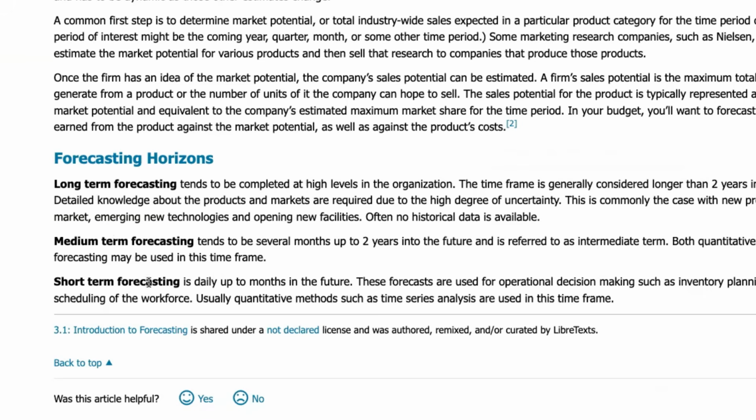So this forecasting, usually we have it when we have a very big, massive project that cannot be done in less than 6 months. So we go by a phase one, phase two, phase three approach. So Sangeeta, what you have to say is that short-term forecasting is something which can be achieved in 4 to 5 months. What you will be doing is identifying how many user stories can be achieved in those 4 to 5 months, what the dependencies are, and how much budgeting is going to be involved. That is the phase one approach.